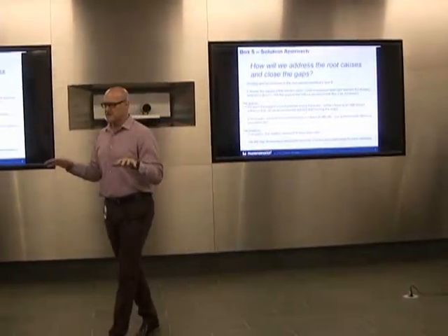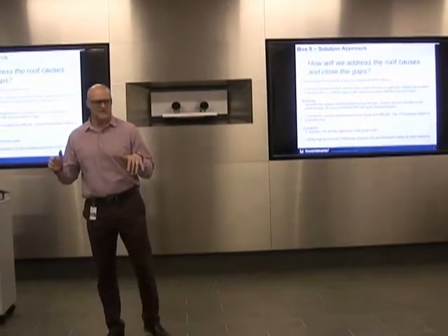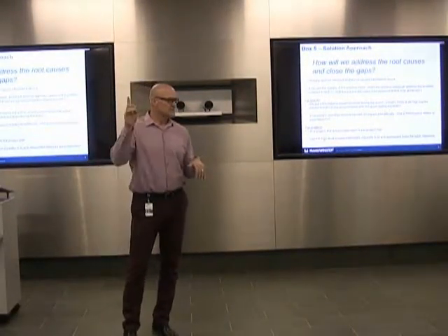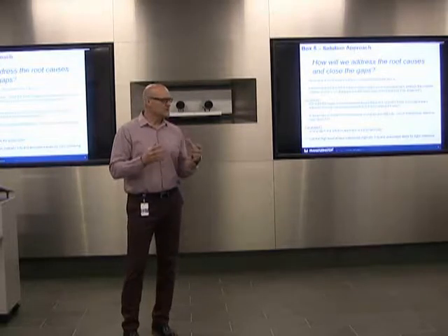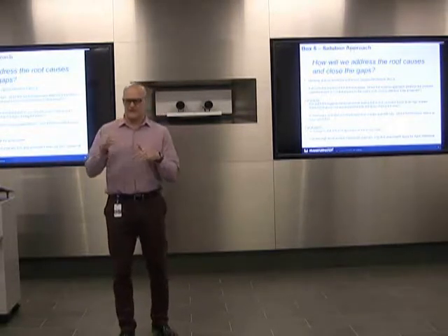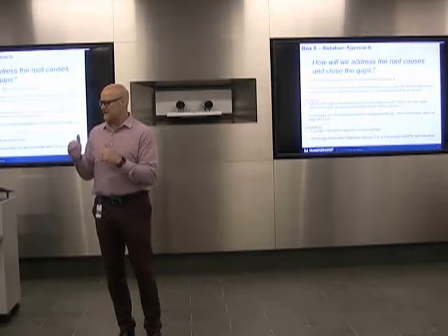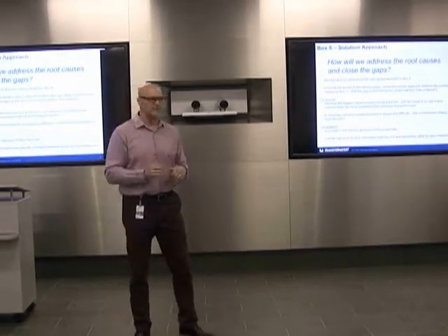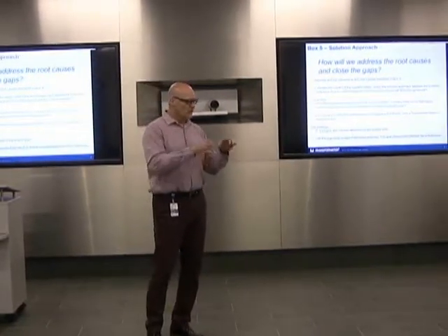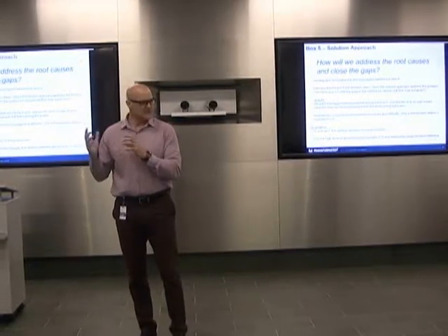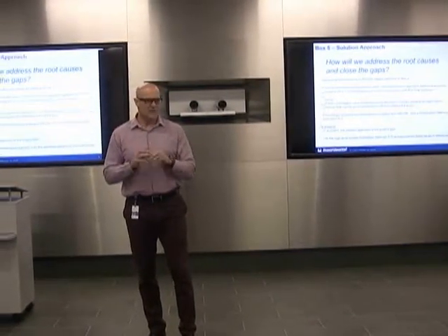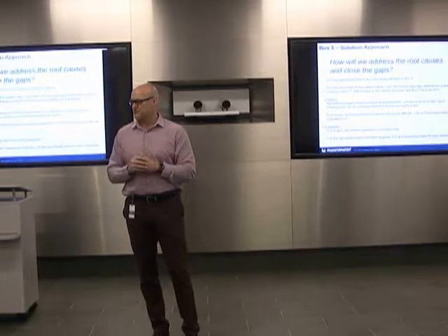Who's done any project management, like Microsoft Project as a tool? Gantt chart? So when you do use that tool, you have some big, bold headings. The big, bold headings are the only things that you want in box 5. All the little tasks that support any of the big, bold headings, I'll show you where those are going to go. But box 5 is just about the milestones.